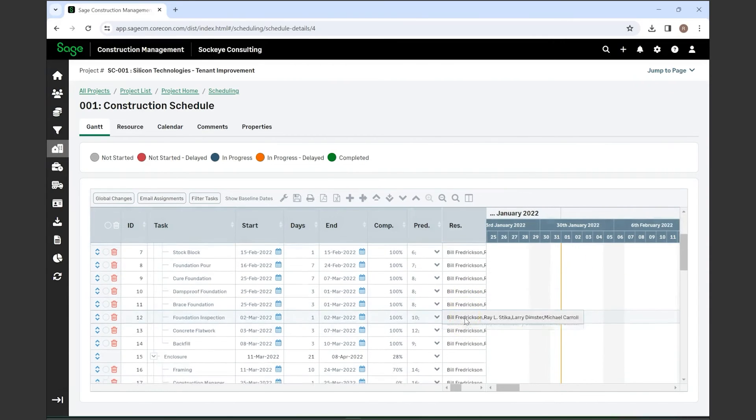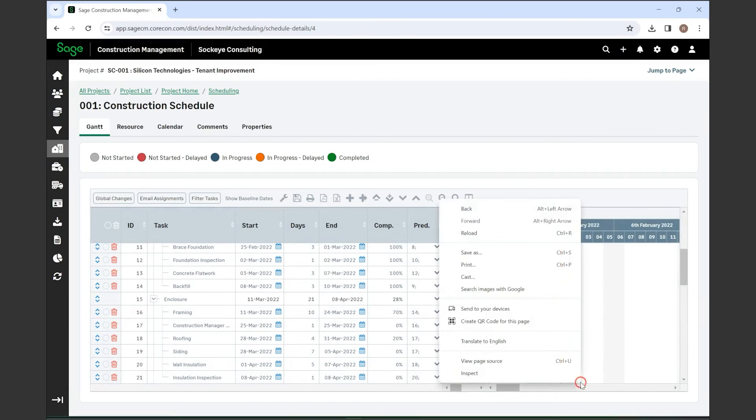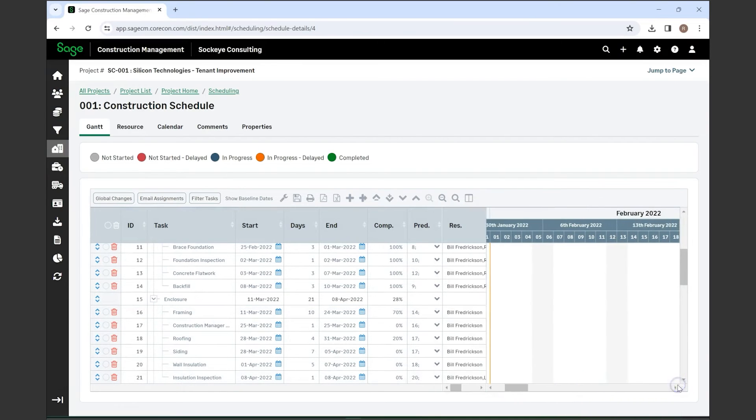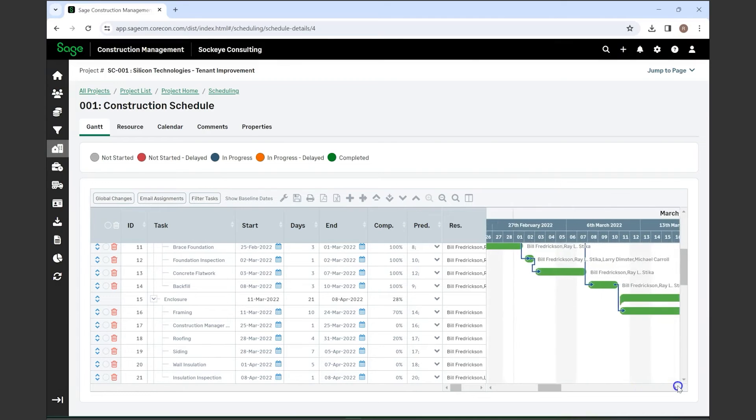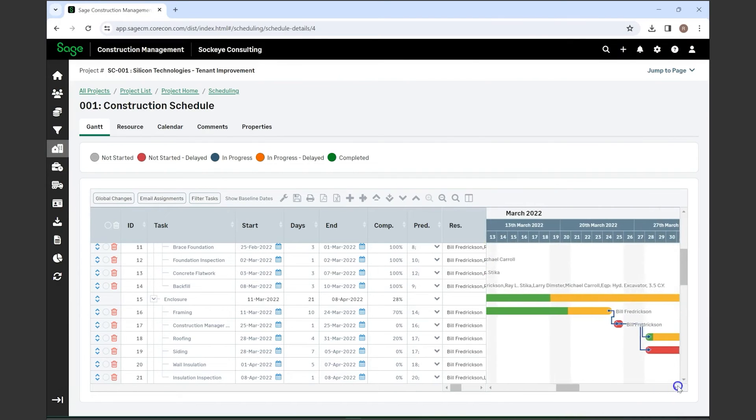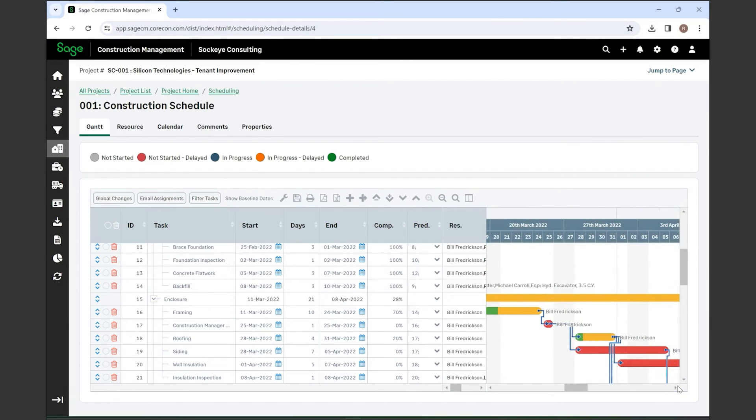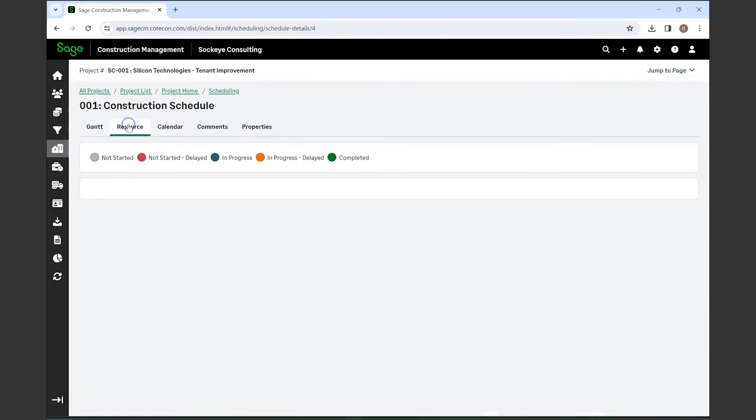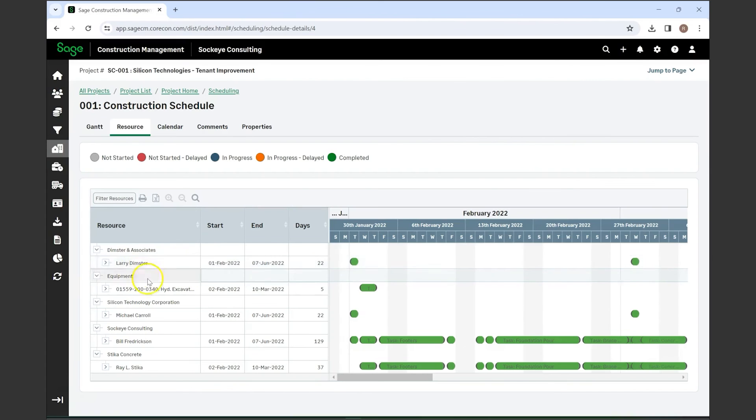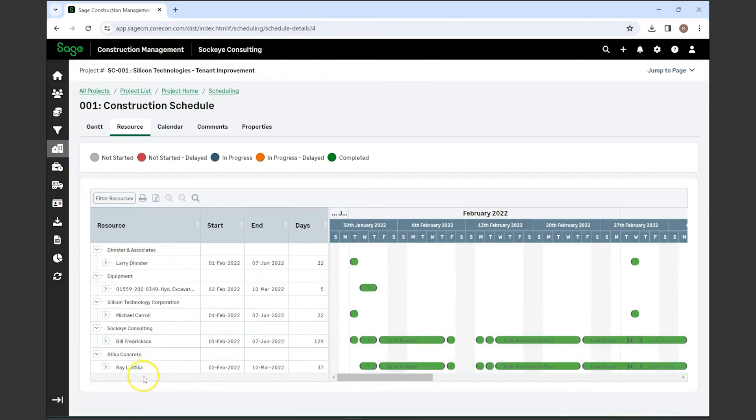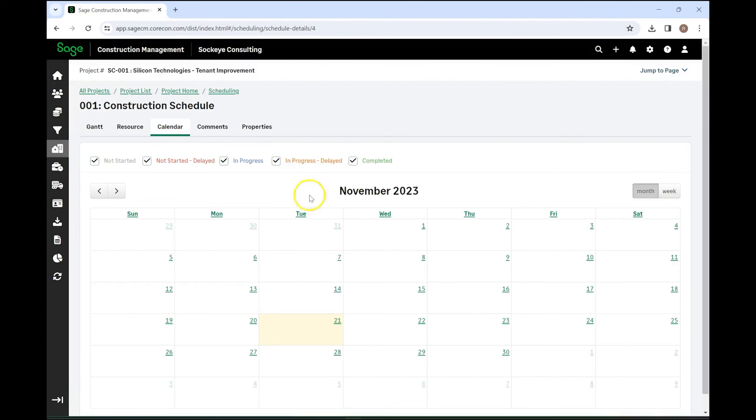If you scroll down, you'll also see when you do have project items that are partially complete, it'll show you that in the schedule. This is able to be exported as both an Excel file as well as a PDF or other documentation. Here are your resources, so as you can see you can mark out any of these items that are going to be used during specific portions of the project. That way you know if you're doubling up too much on certain resources.